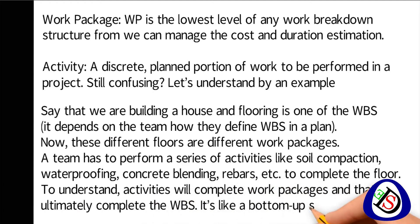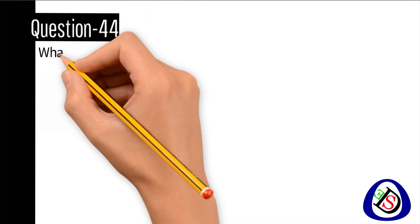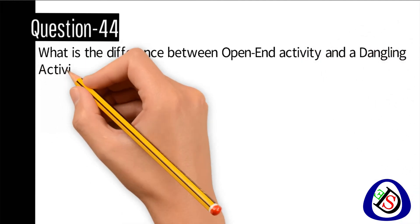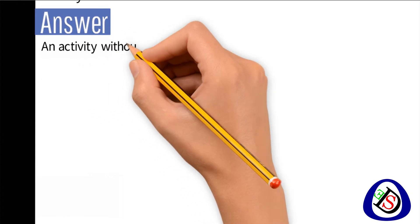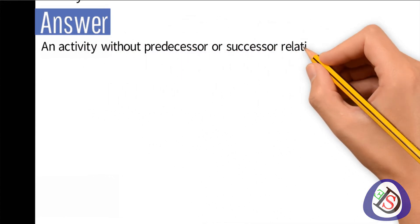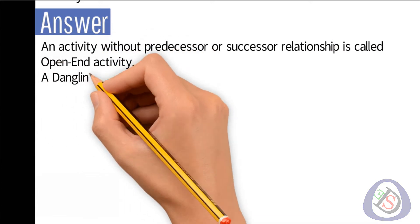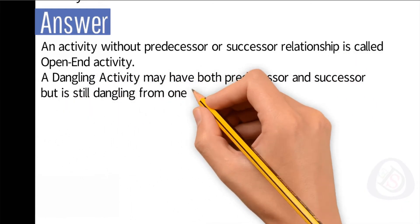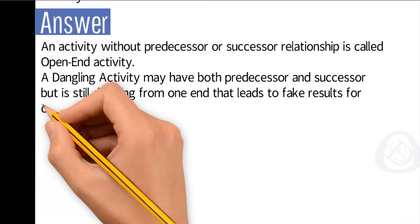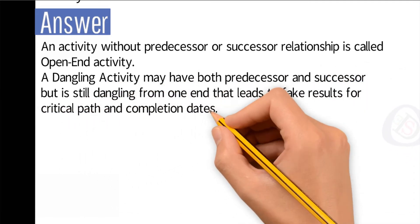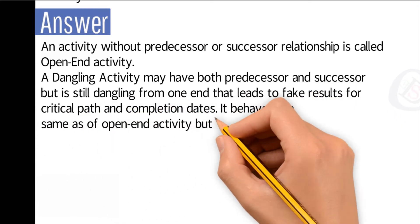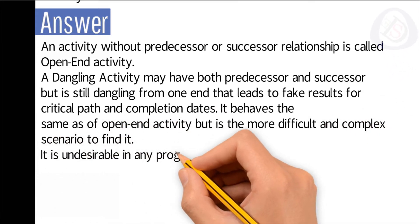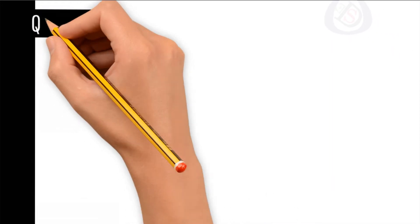It's like a bottom-up scenario. Question number 44: What is the difference between an open-end activity and a dangling activity? An activity without a predecessor or successor relationship is called an open-ended activity. A dangling activity may have both predecessor and successor but is still dangling from one end, leading to false results for critical path and completion dates. It is undesirable in any program and needs to be fixed always.